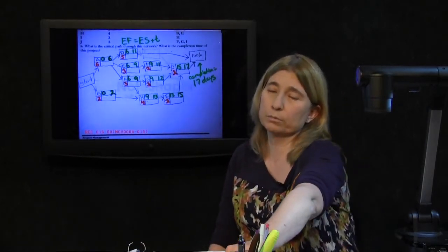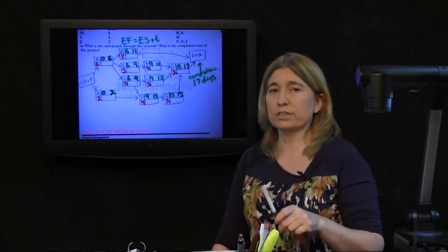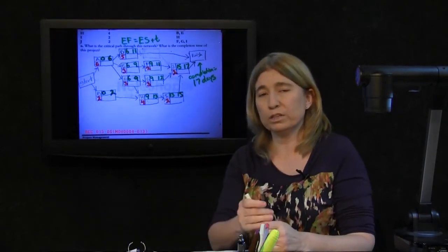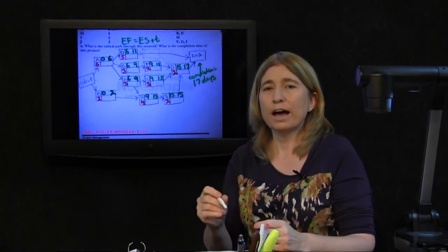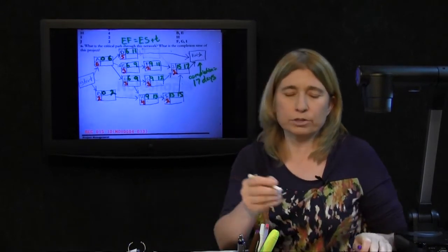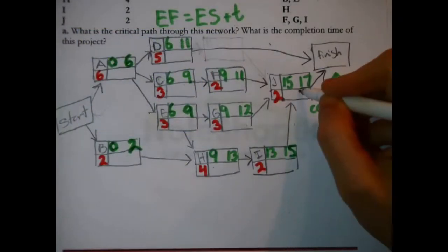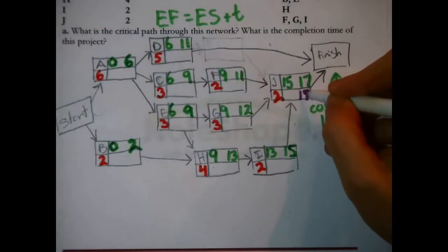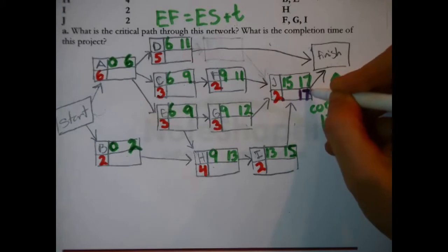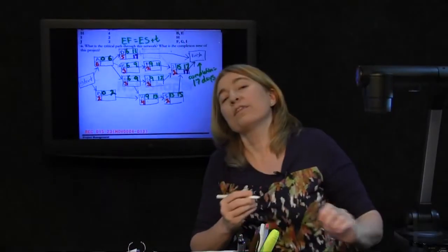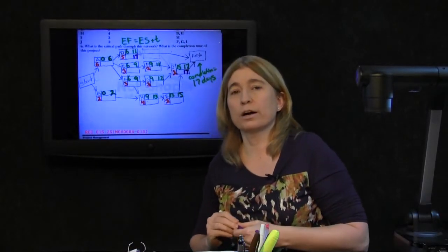We've determined that the completion time of the project is 17 days. That becomes our deadline. We declare that we will be done in 17 days. That means that, again, return to the finish node. Here, look at everybody attached to the finishing node, so to speak, the last of the tasks. Take that 17 and make that their late finish times.